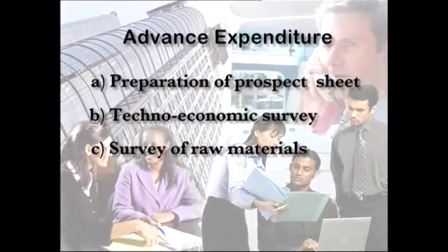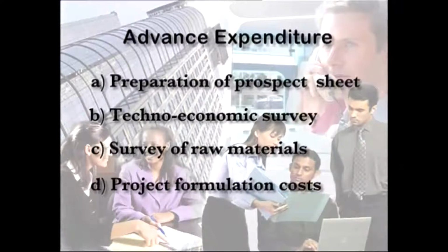In fact, the whole cost of project formulation, as we had discussed in one of our previous episodes, project formulation is a very important activity, and you have to generate reports. To generate reports, you have to do some information collection, and maybe you'll have to hire consultants or experts to do all that. So the total advance expenditure, all that expenditure which you will incur even before the land has been acquired, will also go into the capital cost estimate.